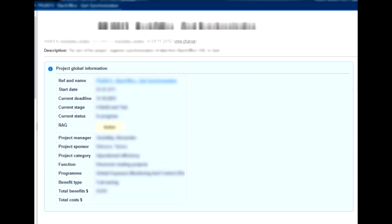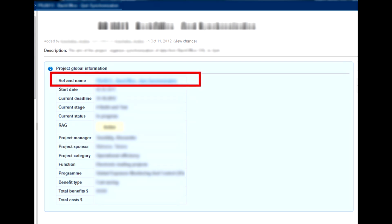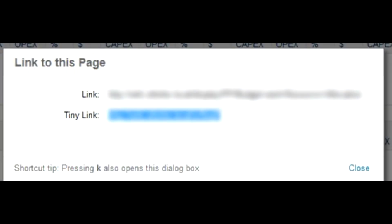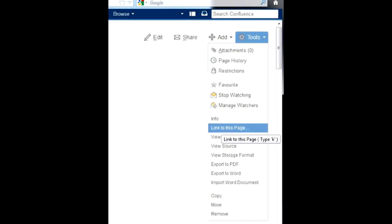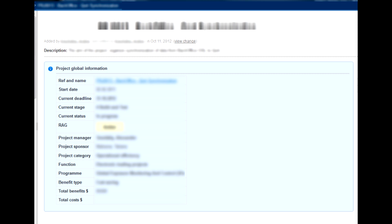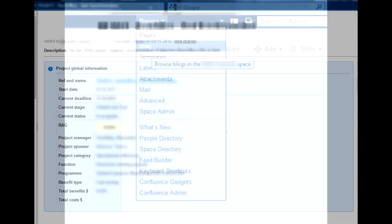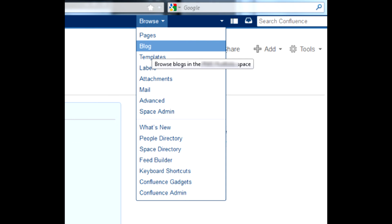All project pages must be created according to this template. Also add the name of the project linked to the page in this table, preferably using the tiny link provided by the page. Tag the page with a unique label, like a project number. This identifier should be used to label all content related to the project. All project progress information should be entered as blog posts with two obligatory labels: the project number and a stage identifier as suggested by your organization's workflow.